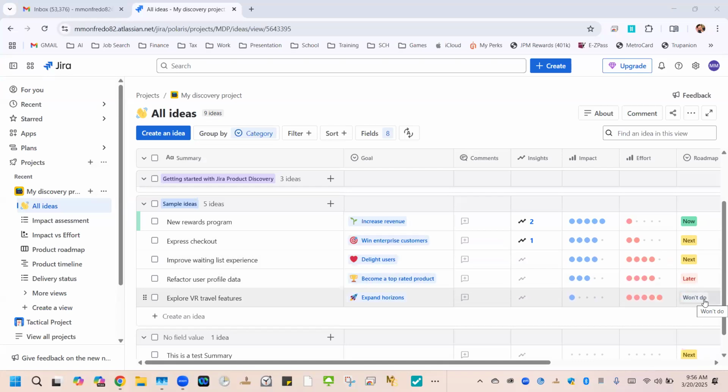The budget could change. We could get more resources. So what we want to say is this is what we're focused on for the current quarter. This is what we'll work on for the next or the next 2 quarters. This is what we'll do by the end of the year. And then instead of won't do, nice to have is if we get these things done early and there's still budget or resource, maybe we can take this on.